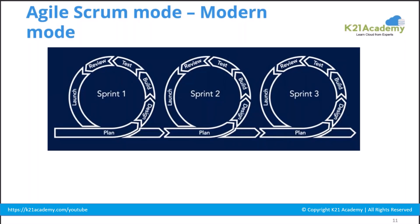Every sprint is two to four weeks, or four to six weeks, depending on the project or client, but not more than six weeks. At the end of every sprint you have something to show the client, called an MVP — minimum viable product. At minimum, a basic result or a dummy web page has to be shown to the client at the end of each sprint.